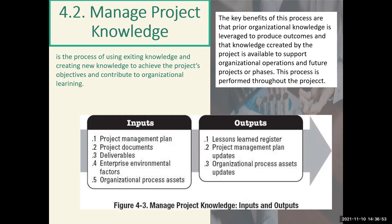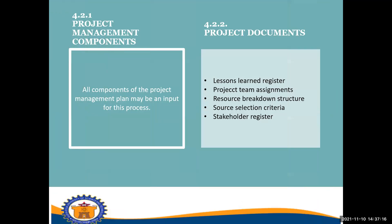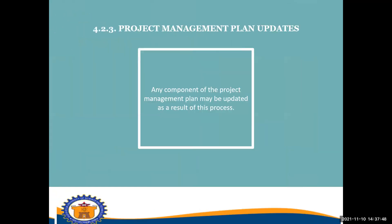For the outputs, we have: number one, lessons learned register; number two, project management plan updates; and number three, organizational process assets updates. The needs of the project determine which components of the project management plan and which project documents are necessary. All components of the project management plan may be inputs for this process. Examples of project documents that may be inputs include but are not limited to: lessons learned register, project team assignments, resource breakdown structure, source selection criteria, and stakeholder register. Any component of the project management plan may be updated as a result of this process.